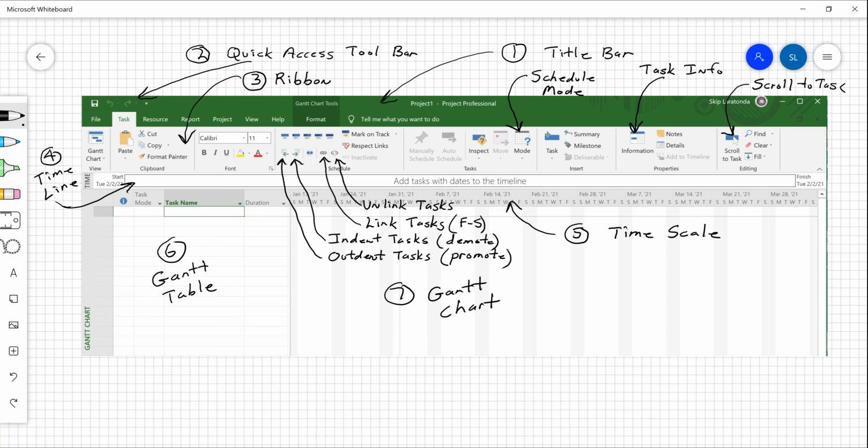That's the first thing I'm going to point out to you, is that when you launch Microsoft Project, make sure you start it in the automatic mode. Before you even start typing tasks, before you put in any durations, because it's not retroactive, you need to make sure that the mode is auto-scheduled. If you don't do that, you take all the dynamic features out of the product. And a lot of people don't know to do that.